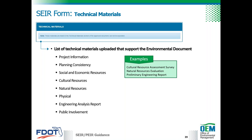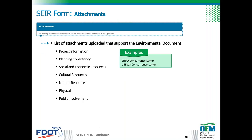Once technical materials have been uploaded while preparing the sections, they'll be listed at the end in the technical materials section. New ones can also be added there if not entered earlier. These documents vary depending on the impacts of the project and include the natural resources evaluation, the cultural resources assessment survey report, and the preliminary engineering report. Although listed there, the documents themselves are only included in the SWEPT project file. Similarly, uploaded attachments will be listed in the attachment section, with examples including concurrence letters from SHPO and the U.S. Fish and Wildlife Service.